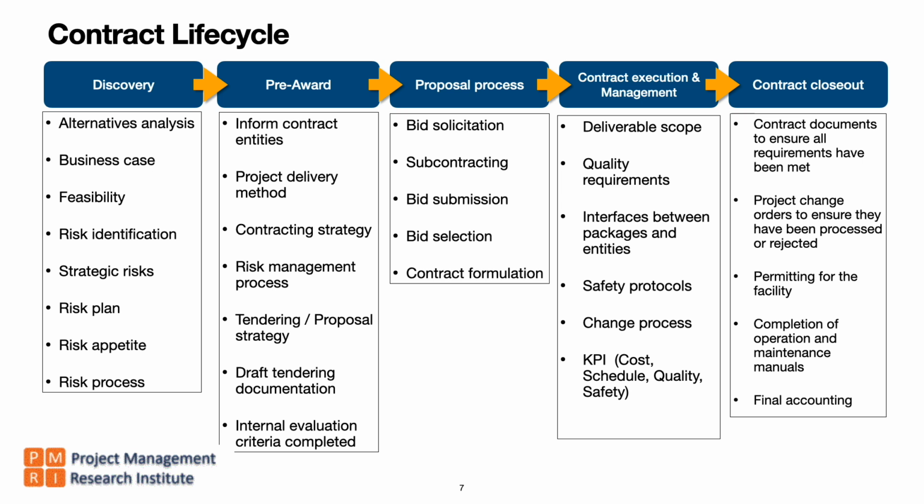They identify the risk, both strategic risk and tactical risk. They come out with a risk plan and they also analyze the risk appetite of the owner and how much risk they are willing to take. And they define a risk process.